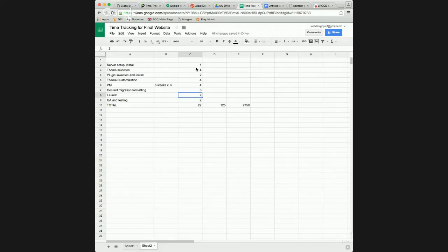Okay, $500 website. I'm gonna make them install WordPress on their own site. I'm gonna choose one theme for them and tell them that they're using that theme. I'm gonna use my standard 4 plugins and no extras. I'm gonna tell them I will throw your logo in there and I will change the colors. I am going to meet with you once to discuss the project, once to review the project, and once to launch the project. I am going to put in almost none of your content.